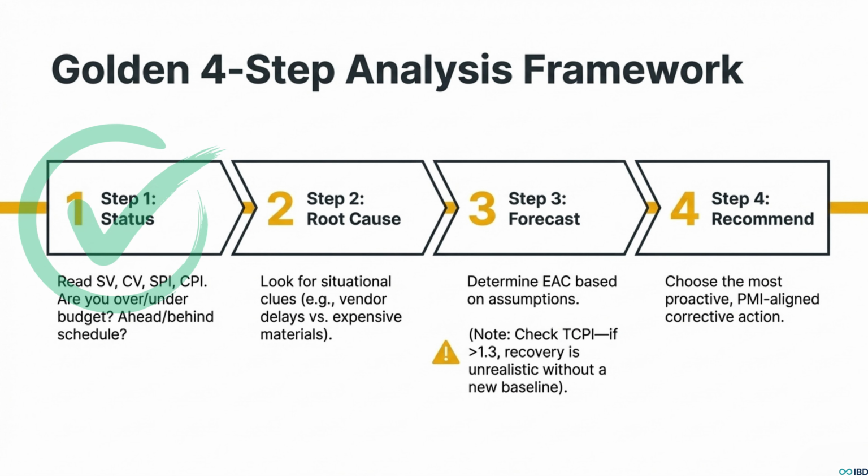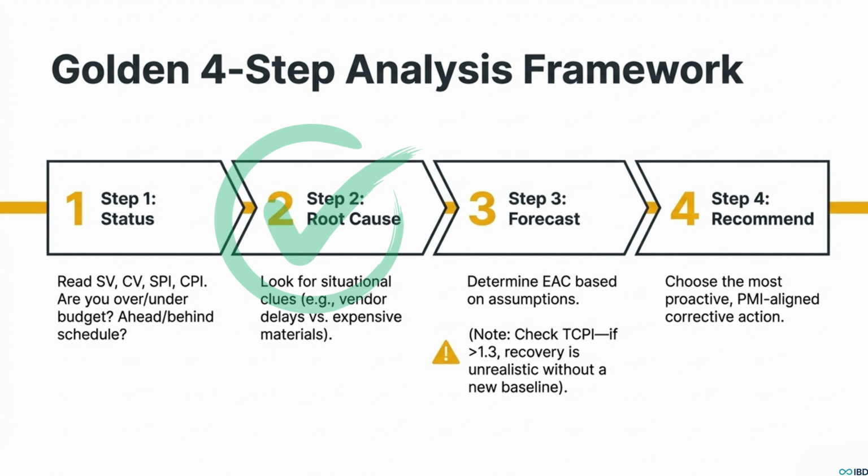Seriously. Step 1 is always status, just the facts. What do the numbers tell you? Are we over or under, ahead or behind? Simple. Step 2, root cause. Okay, now we play detective. Why is this happening? You've got to dig into the question for clues.